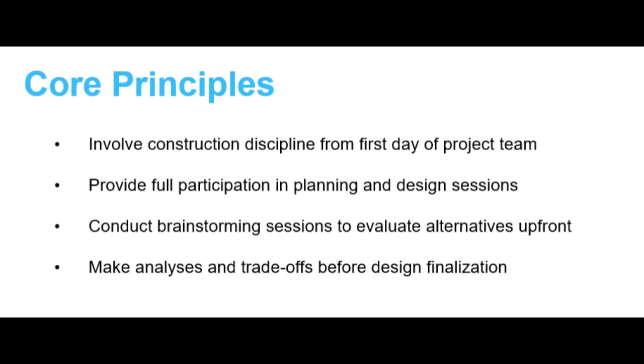More expensive in terms of rework, redesign, variation orders. More disruptive means delay of work, delays, disputes between stakeholders, and claims from the contractor. So these two are expensive and disruptive.